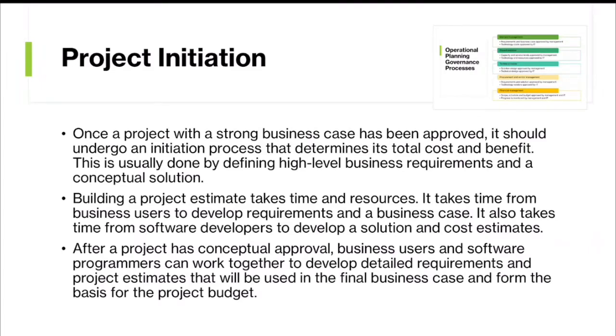After a project has conceptual approval, business users and software programmers can work together to develop detailed requirements and project estimates that will be used in the final business case and form the basis for the project budget.